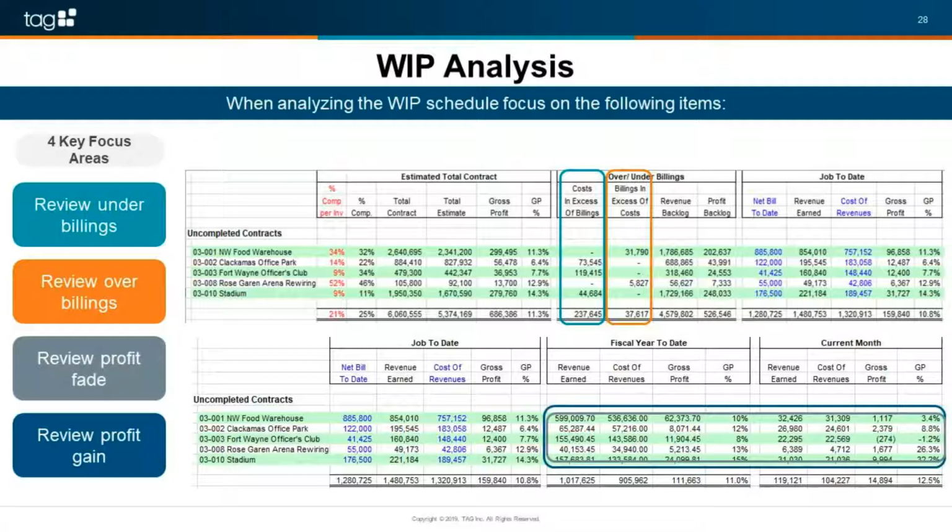It could also be unapproved change orders, right? So here I've done work for change orders, but work's complete, but I haven't received that approved change order. So I'm not recognizing that revenue side of that change order. So this is a good opportunity for me to have a discussion with my operations team and making sure that we're trying to collect on these change orders where we've completed the work, right? We've done the work. So why aren't we collecting these change orders on our contract? These are just some of the few things that I look at to really identify what's going on a job and why it truly is underbilled.